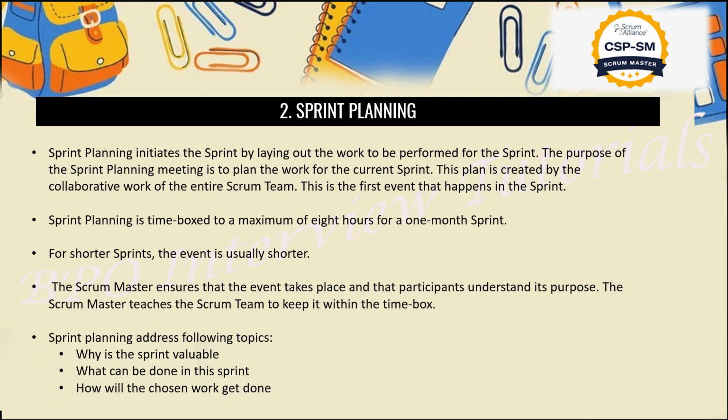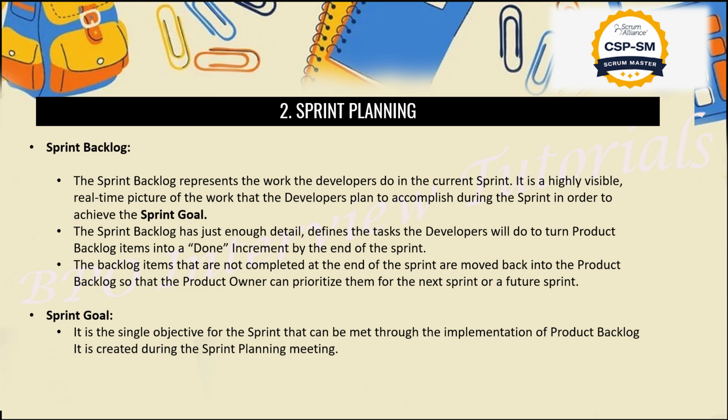Why do we require it? In sprint planning we will discuss all these points: why the sprint is valuable, what can be done in this sprint, and how we will choose the work that can be done immediately. So discussions like why, what, and how will be held in the sprint planning meeting, guys. In the sprint planning, I told you in the previous slide, we will also generate the sprint backlog, right?